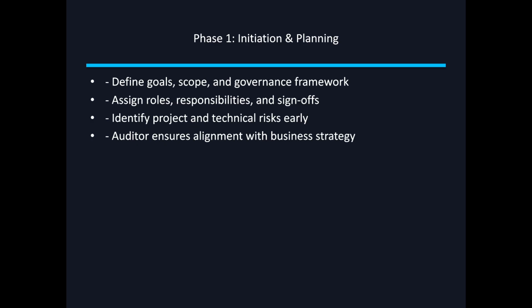Just sharing an example which I faced as an auditor. A public sector IT project started without a formal charter. Months later, a dispute arose over scope and ownership, causing delays.